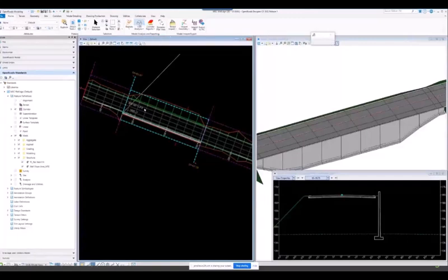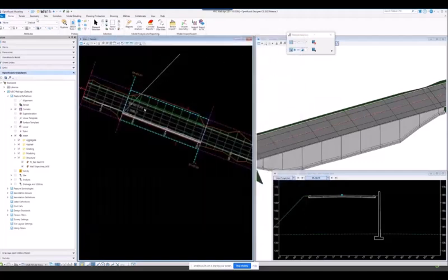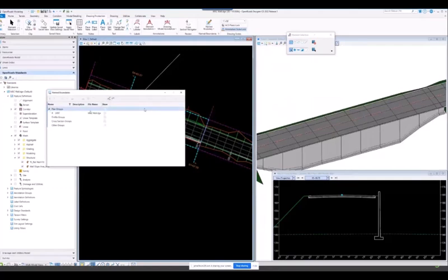So with that being 10,000 percent, when we run a report for quantities, we're going to just run it for the entire model here. We'll get that feature definition. The feature definition is obviously wall slope area MSE. We see it's roughly about 5,700 square feet. So okay, that's good. That's what I'm after. It's a great way I could get it in the model. If I wanted a right wall, left wall, I could make two different feature definitions. I could break it up any way I like.